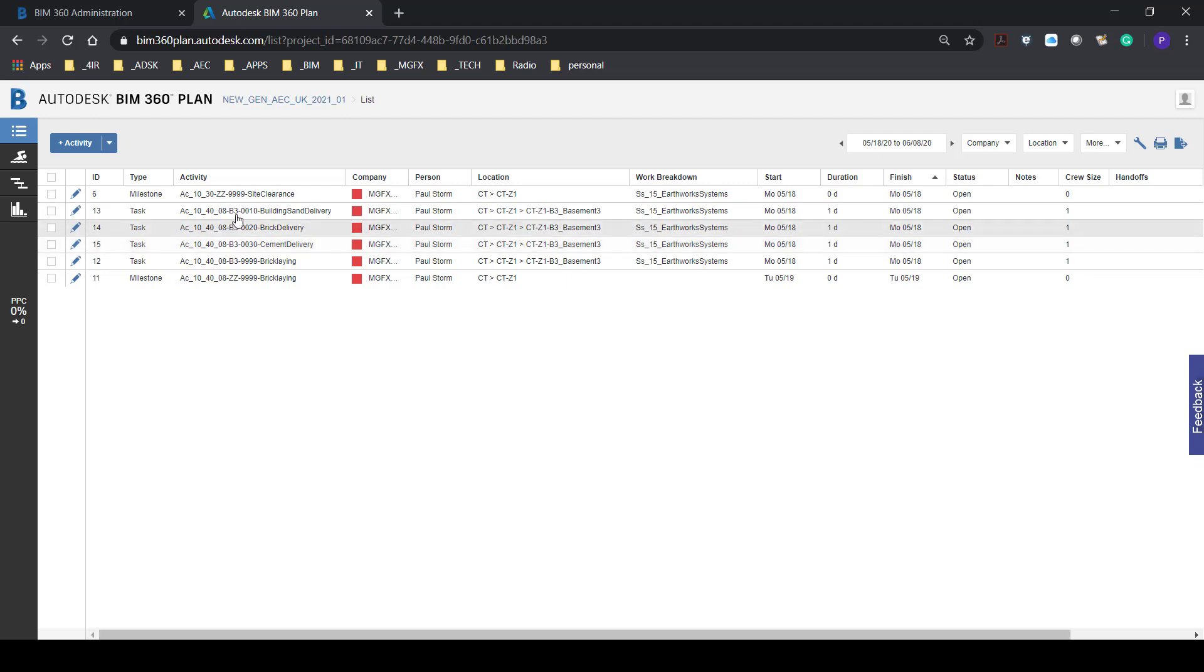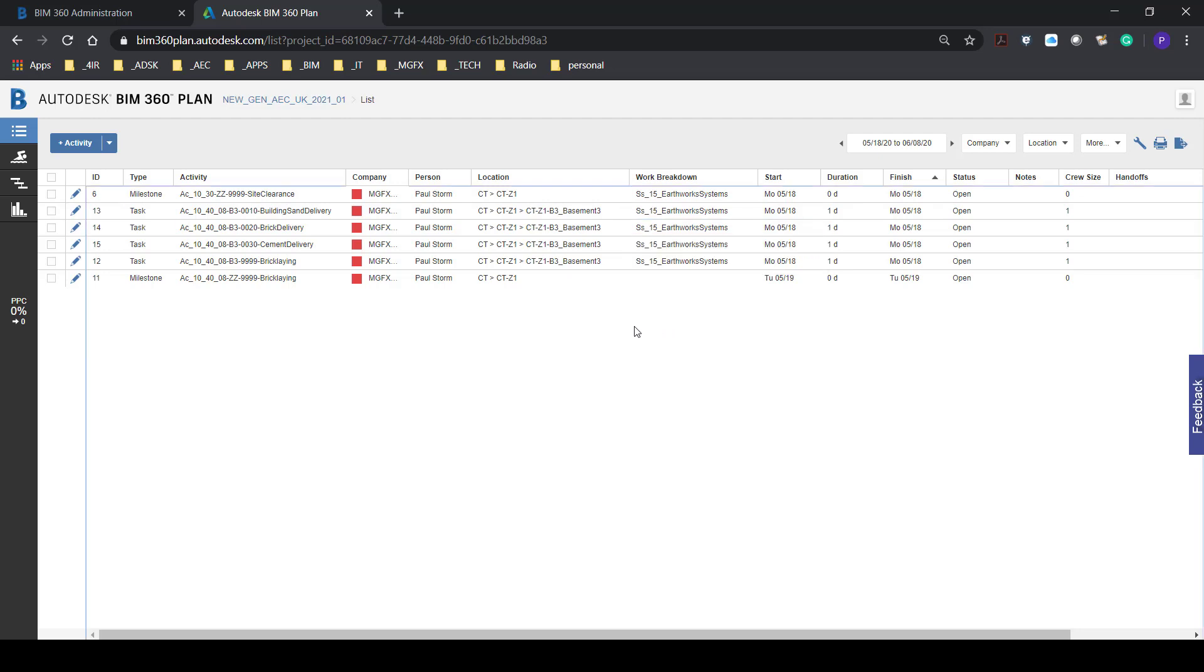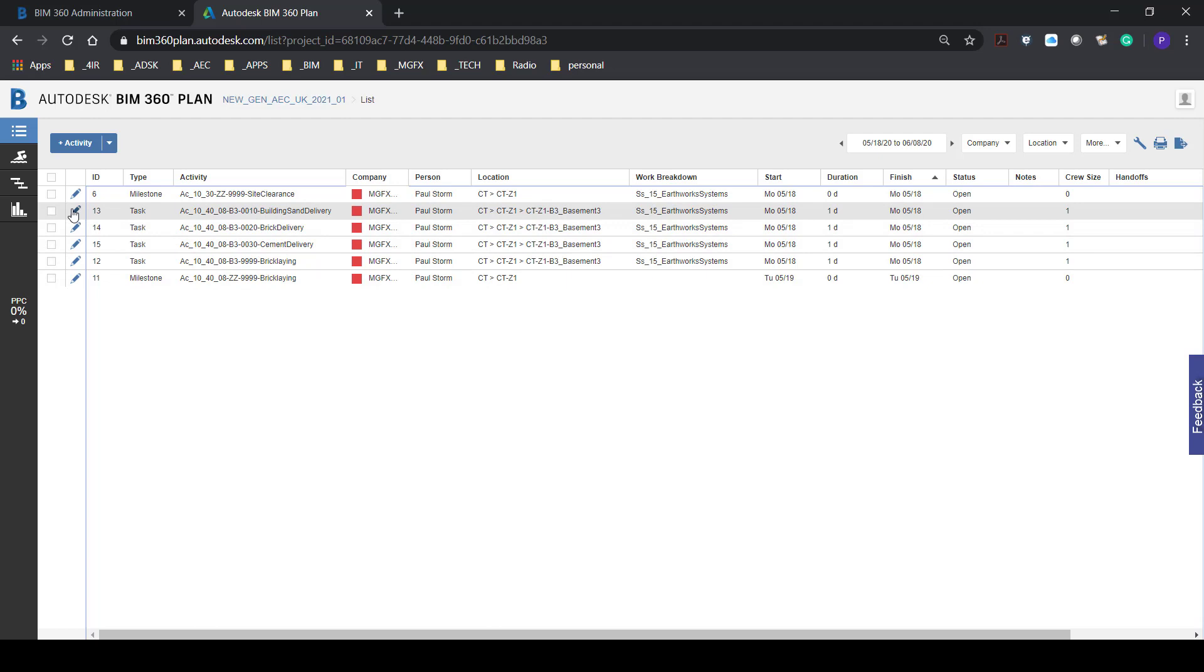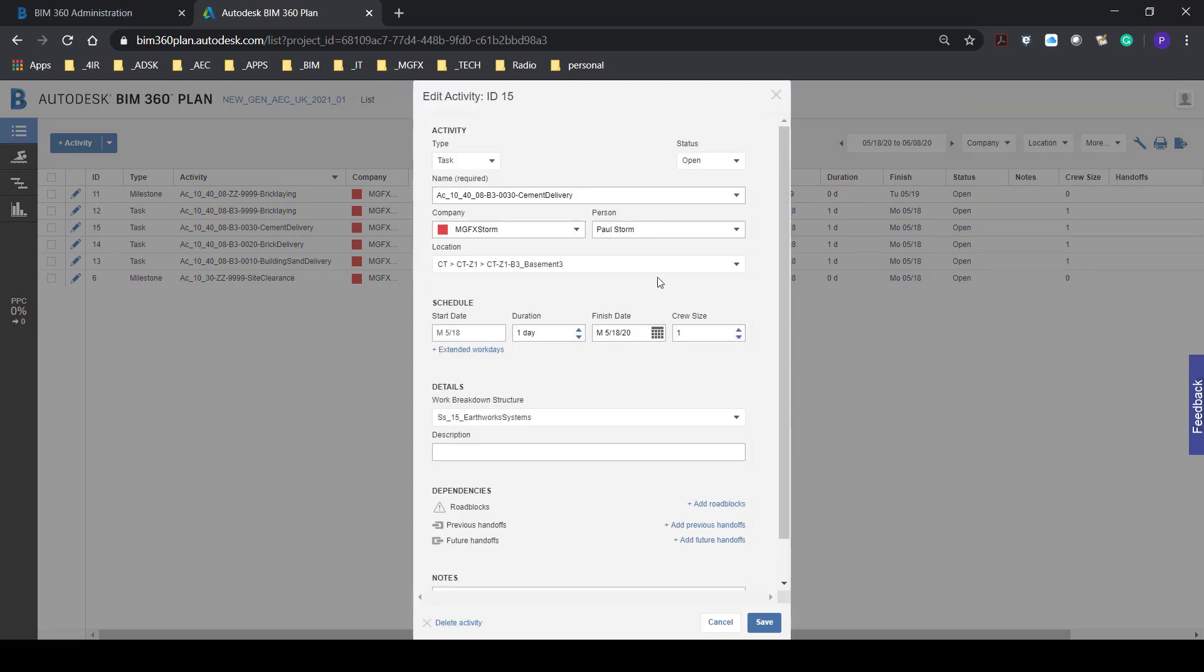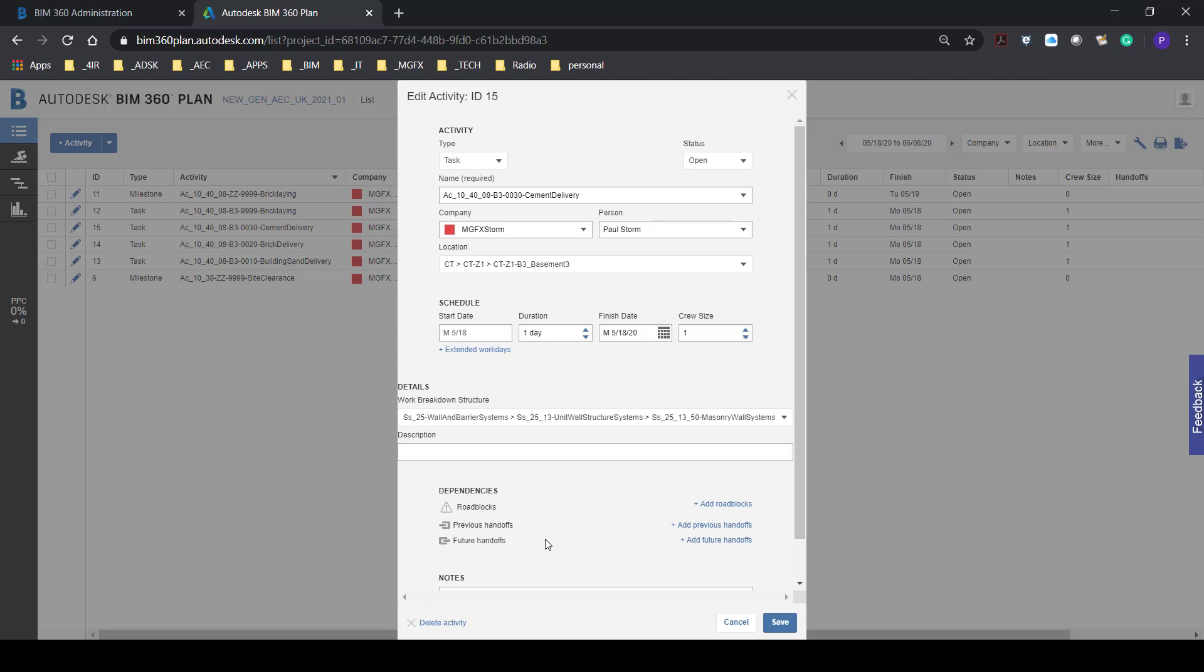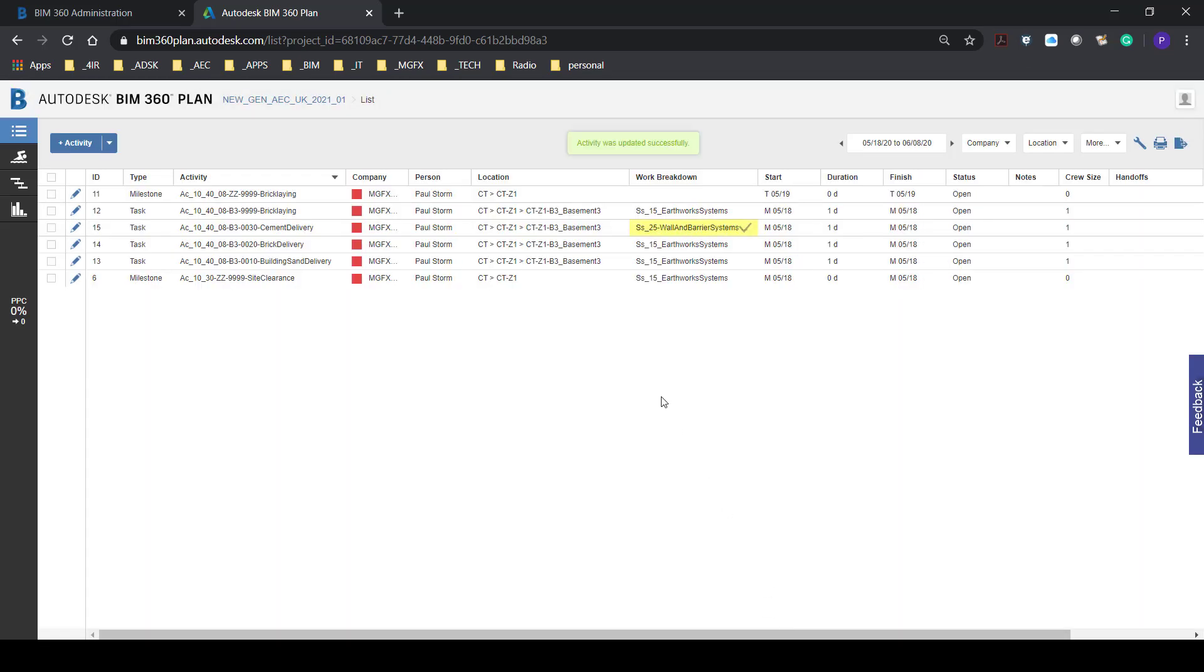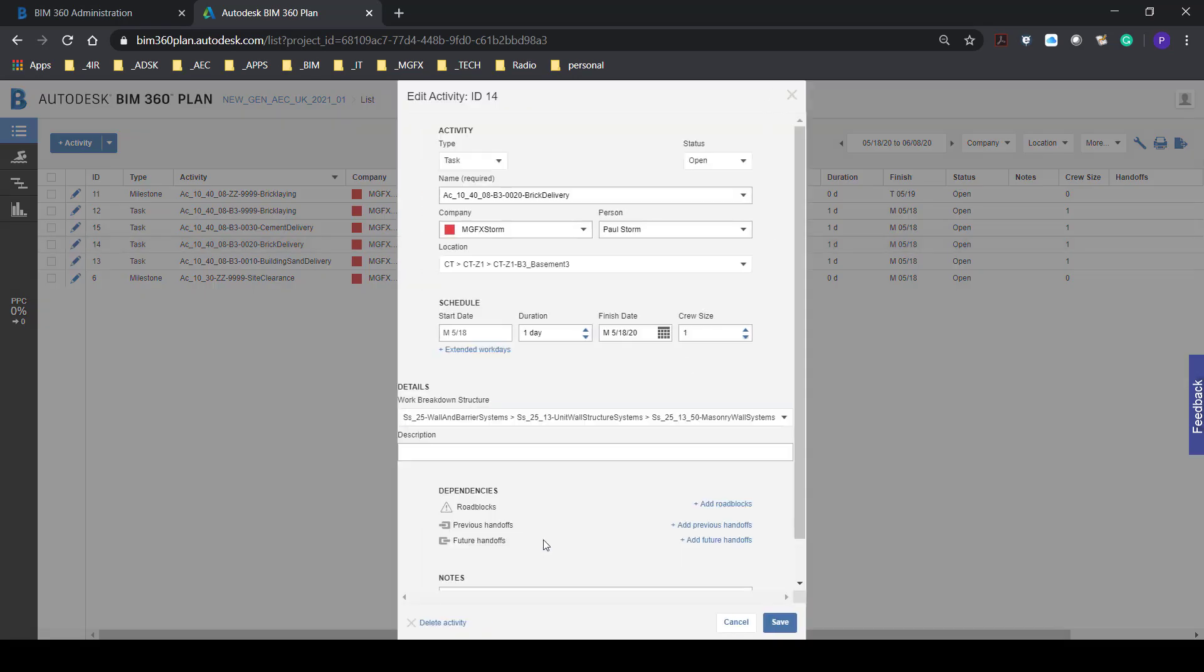I'm specifically interested in this area over here. Let's see if we can edit this, sort the activity by name, edit the task and then we should be able to apply the correct workbook structure item, the one that we've just created.